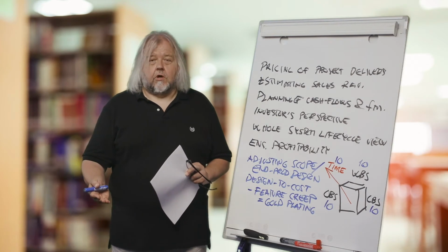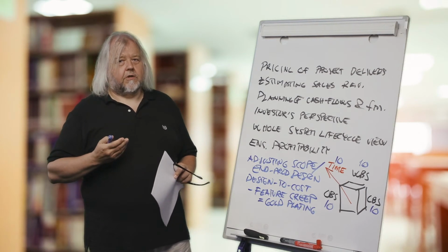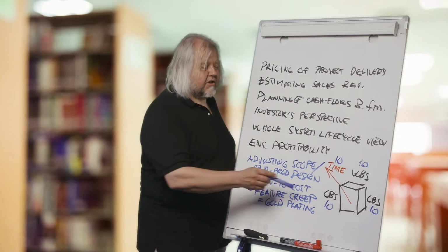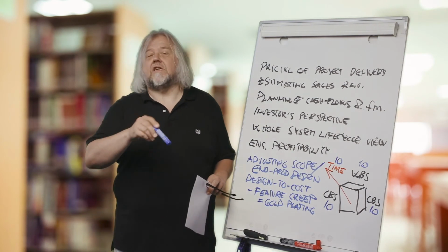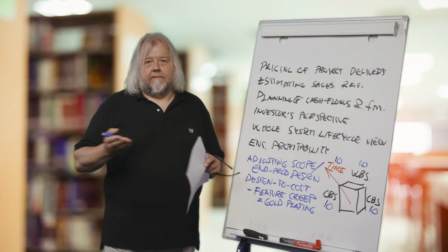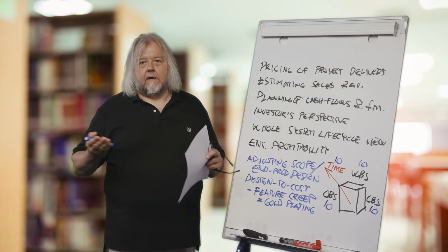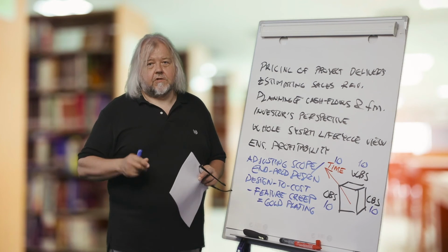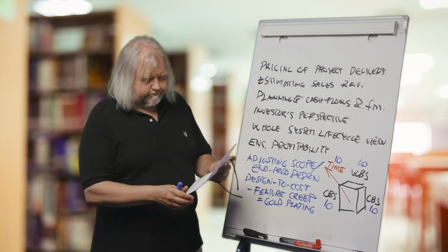But if we really go into such detail, our project management becomes not the management of a project, but the management of a system for managing the project, because we must adjust our estimates all the time, as estimates are updated throughout the project until the end. And of course, when we are comparing the actuals to budget, for example, we get a lot of deviation reports at the very low level, because there will be deviations.